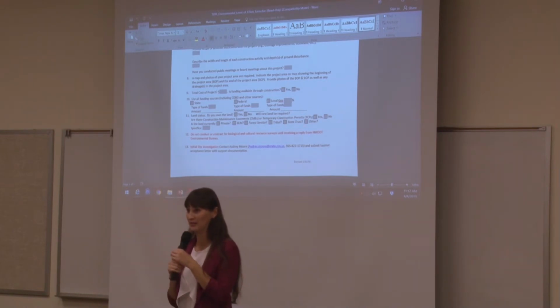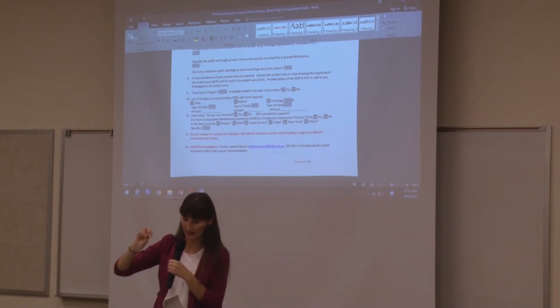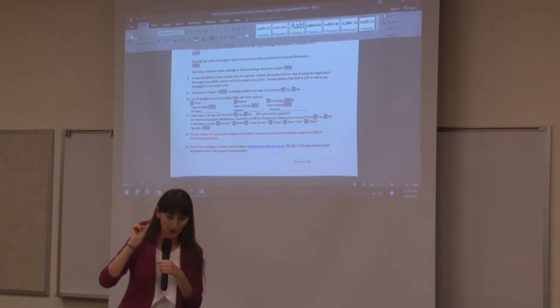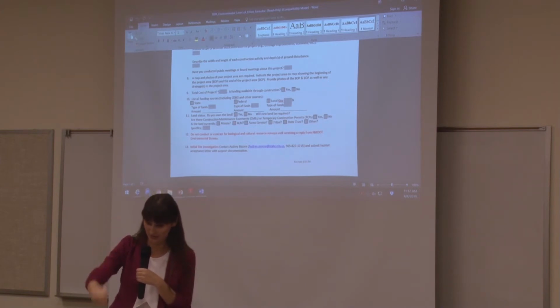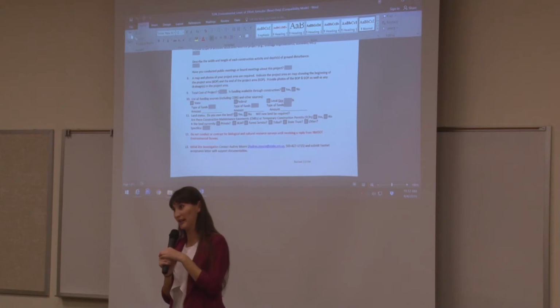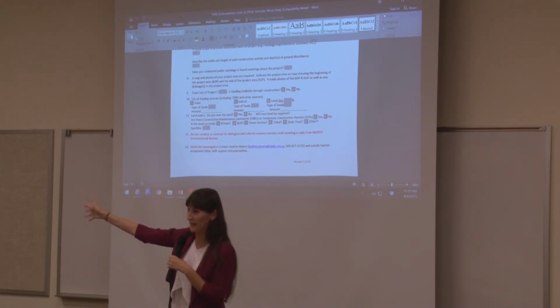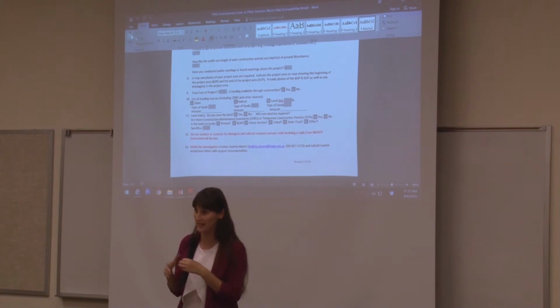Well, guess what? There was a bird in that dead tree. That bird had a nest, and that nest happened to have eggs of endangered species in there. So they were not able to cut down that dead tree in their park until all of those baby birds flew away and someone was able to remove that nest.